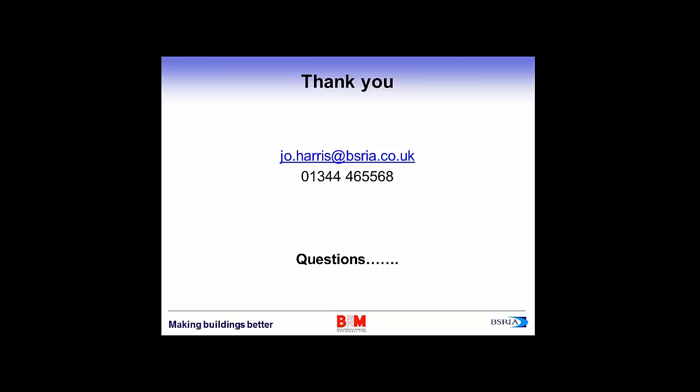Fantastic. In preparation for the data migration, can you please explain how the BIM was developed during design and construction, specifically what data was requested by the owner, and then specifically how was this captured in the BIM and by whom? I think if you look at the 1192 Part 3 document, that talks about the importance of the operator specifying information at the beginning and making sure that gets delivered at each stage of a project as you go through the gateways, and not wait until the end to just receive what the project team think is necessary. So we need to take a bit more of a proactive approach in this if we're going to make that happen. There are templates being compiled on assets where manufacturers are busy populating those for their products so they can be added to the model. But if you go back to my slides, it's not all about the model, it's about the information. So it's really up to the operations team to define what information they need to be more efficient.